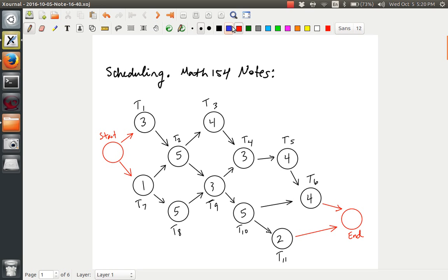One thing you should think about is if you have a vertical line, and you just move it around. As you move it around, it's going to cut the critical path exactly once at every moment. Wherever that critical path ends up, this vertical line will cut it exactly once at every moment. Okay? So keep that in mind.